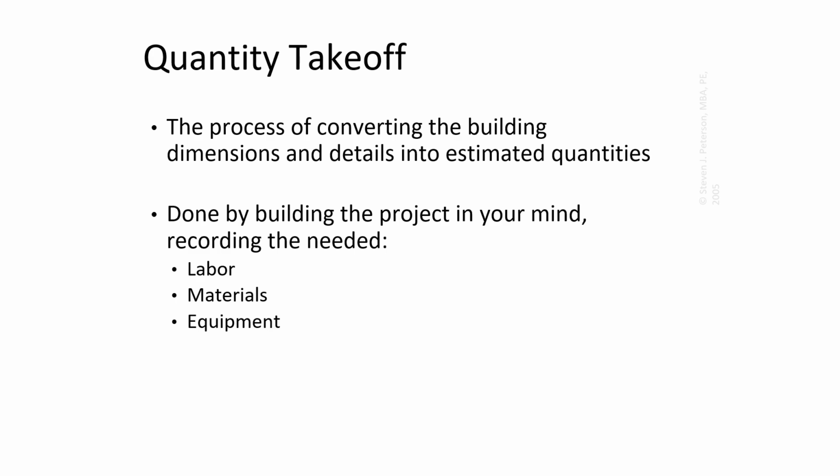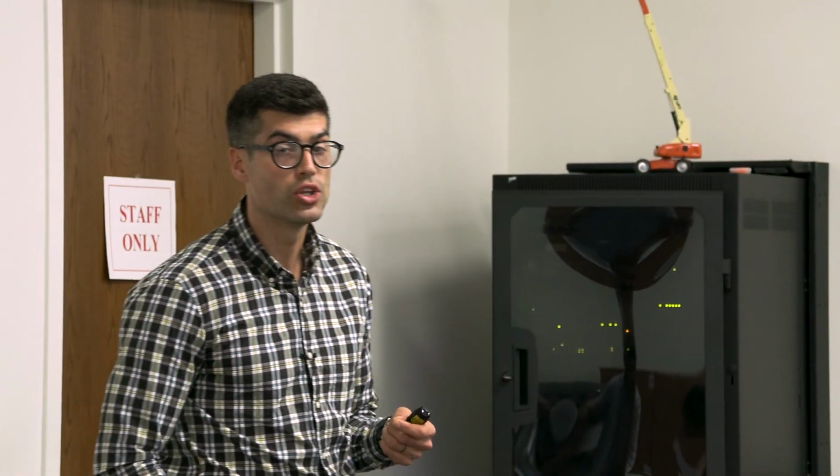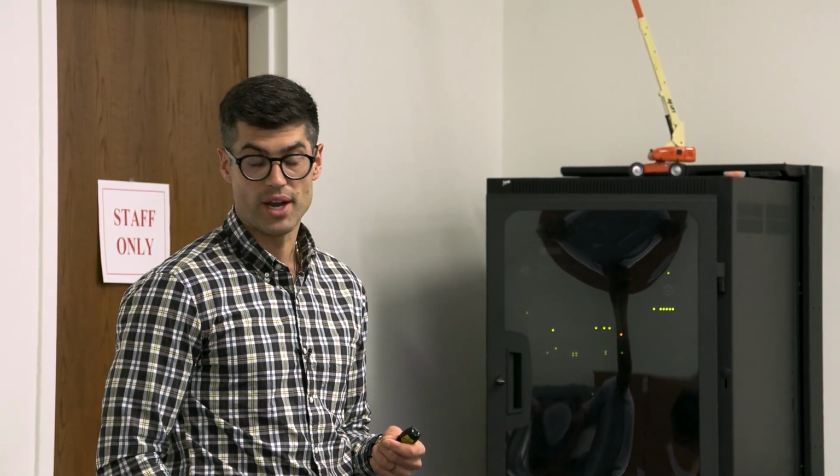Now we really get into quantity takeoffs. And a lot of times this is just evaluating the quantity takeoffs of our subcontractors, or it's producing the quantity takeoffs ourselves, or it's checking the work. A lot of times what I'll do from a PM standpoint, of course I'm going to check the overall number, but I'll spot check things. And I'll spot check things that are really important and on the critical path, right?